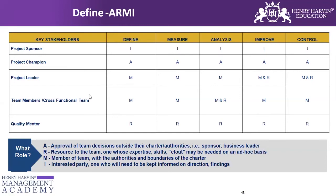Now I want to explain how the project sponsor, project champion, project leader, team members, and quality fit under ARMI. The project sponsor is the head of the department, function, or business unit. They are the one getting impacted and that's why they want this project done — they sit at the top. The project champion is one level below the sponsor, responsible for giving directions, removing roadblocks, and giving certain approvals.